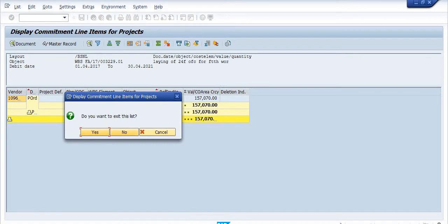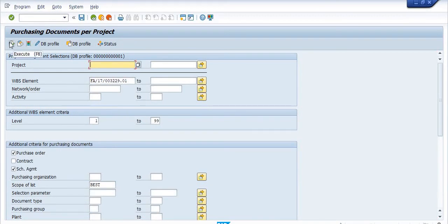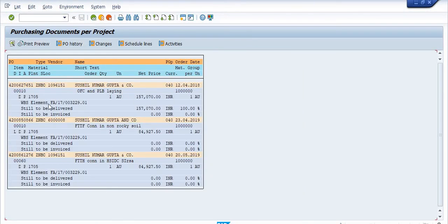The second method is ME2J. I copy the WBS element and execute transaction code ME2J. You can see this purchase order is still to be delivered — 100% still to be delivered, 0% still to be invoiced. For the other two purchase orders, 'still to be delivered' and 'still to be invoiced' are both 0%, meaning those POs are 100% invoiced and nothing is open with respect to the WBS.